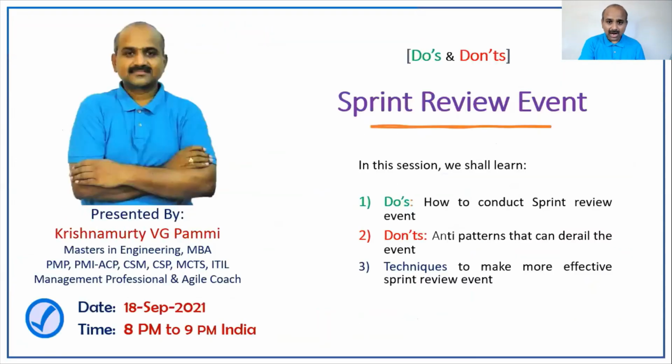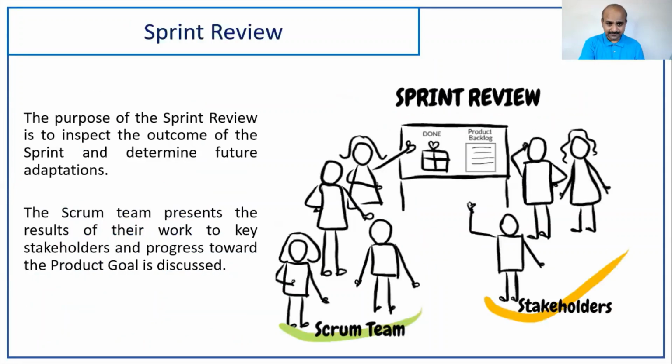Now, what is the sprint review event? How to conduct the sprint review event is this. As a scrum master, you will facilitate a 30 minutes mock or preparatory session before the main sprint review event, just to make sure of things like: this story, who presents? What are the key points that we need to present?